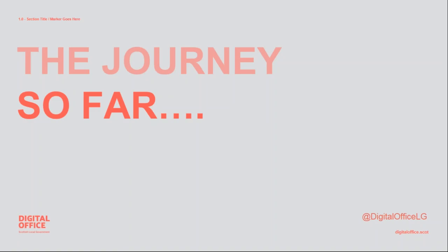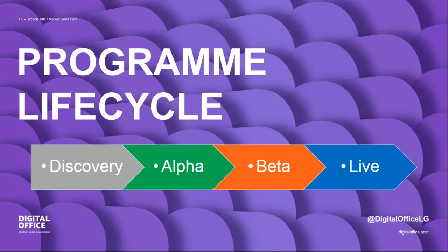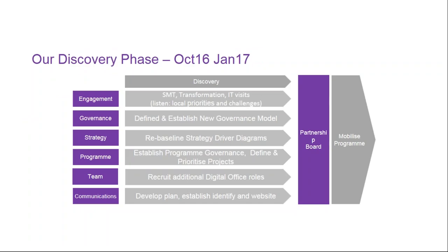So the journey so far. We follow GDS, the Government Digital Service, quite closely and they have an agile methodology with a program lifecycle of discovery, alpha, beta and live. When we first set up in October last year we took that same program lifecycle to get to where we are today. In the discovery phase from October to January, it was only myself and Colin — myself as Chief Digital Officer and Colin as Chief Technical Officer — and we went out and engaged with senior management teams across 30 councils around Scotland. We defined the governance, baselined the strategy, established programs, and defined prioritised projects — a whole lot of stuff in three months.